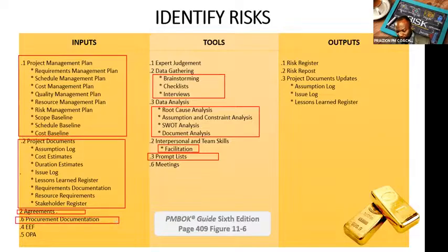Going to the next one. So that should actually read 5, and then this should read procurement documentation. If the project requires external procurement of resources, the initial procurement documentation should be reviewed, as procuring goods and services from outside may increase or decrease overall project risk. So there's quite a lot of information to be digested in these sections. I would like you to pay close attention to those for your exam.